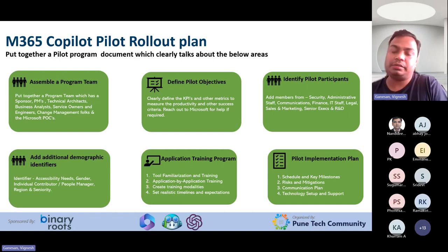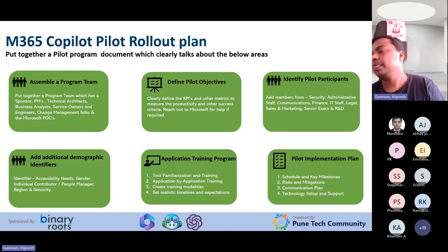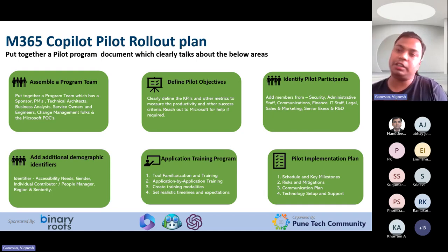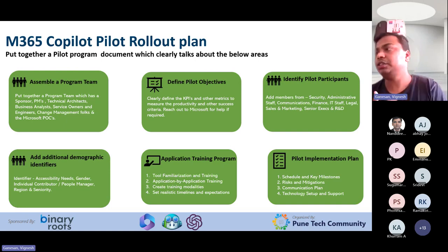As of today, it's all about, well, here's the license, good luck. So it's all about you making sure that you're coming up with proper trainings. You can work with Microsoft, they can help you, but they do not have any formal use cases yet. Then you also clearly document the pilot implementation plan. You can talk about the schedules, your milestones, what the risks and mitigations are going to be, what your communication plan is going to be, and also the technology setup and support as and when required, right?